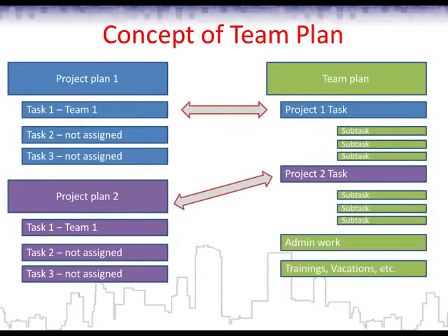Because in a project, in a strong matrix structure, if, for example, a team member gets sick, then a project manager has to find a replacement and update his plan. And these changes may happen daily, and this creates a lot of overhead for the project managers.